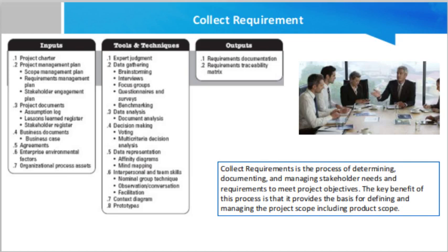Functional requirements will elaborate on the features and functions of the system. Non-functional requirements do not talk about the system functionalities, but they determine the system quality parameters such as performance, usability, etc. The requirements traceability matrix provides traceability from the requirement ID to the source of requirements, design, implementation, and test verification. You will update the requirements traceability matrix document multiple times during the project.